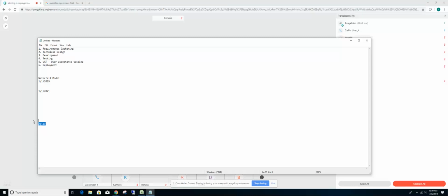Now, in Sprint Cycle 3, let's build the ability to create groups. In Sprint Cycle 4, let's give the ability to share pictures and videos. Sprint Cycle 5, let's give the blue tick feature. In Sprint Cycle 6, the phone calling feature. In Sprint Cycle 7, the video calling feature. In Sprint Cycle 8, the delete feature. So what are they doing? They are giving the basic product and dividing the whole idea into meaningful chunks called sprints. The end goal of Agile is to put the product in front of the customer as early as possible.